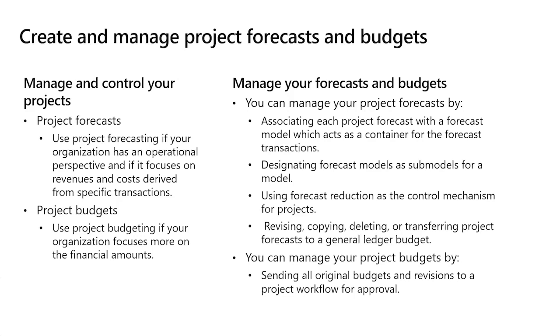So when you use project forecasting, you can enter forecast transactions in the forecast forms for each and every transaction type. That means that every attribute available for an actual transaction can also be used in the forecast transaction. Think of things like line profitability, line attributes, workers, or descriptions. And you can also project how long after you incur a cost you will invoice a customer. Project forecasting transactions are based off of units and amounts,